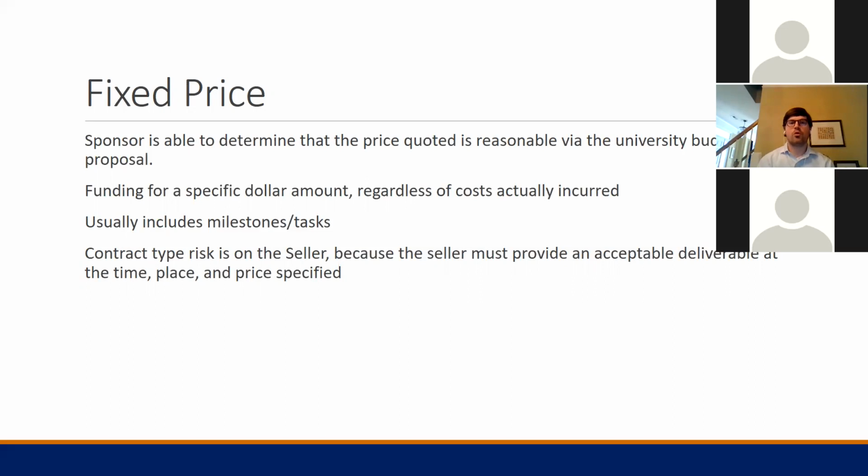we're going to quote what we think is reasonable as far as the budget, in our proposal, the government is going to accept that, and then if we go over or under, we're still going to have to deliver those deliverables in most cases, and this is sort of a general view of it. I think with R&D work that is watered down somewhat because again, there's an understanding that we're doing open-ended research and that it's not the same as delivering a widget. But I think from the payment structure, that's sort of the perspective.